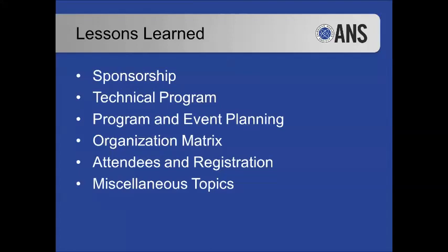And just in general, the catering and all those relationships for supply, try to get that sorted out before your conference proposal. Don't just have estimates. Know who you'd be working with if you continue to win the bid and go down that road, and get those estimates for your budget, of course.